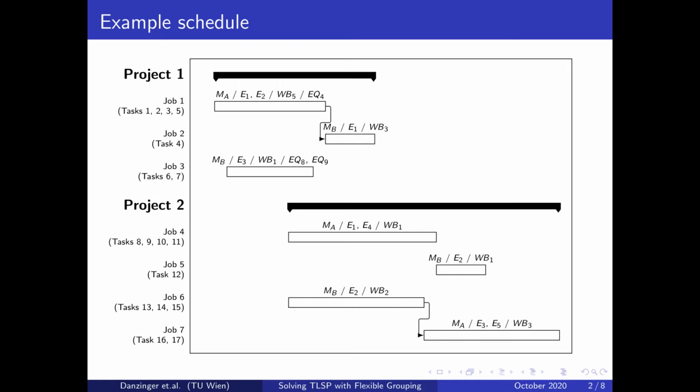For example, instead of having homogeneous resources where each unit can be used for all jobs, each job defines a set of available units for each resource, and only those units can be used to perform the job. For example, employees need certain qualifications to perform each task.